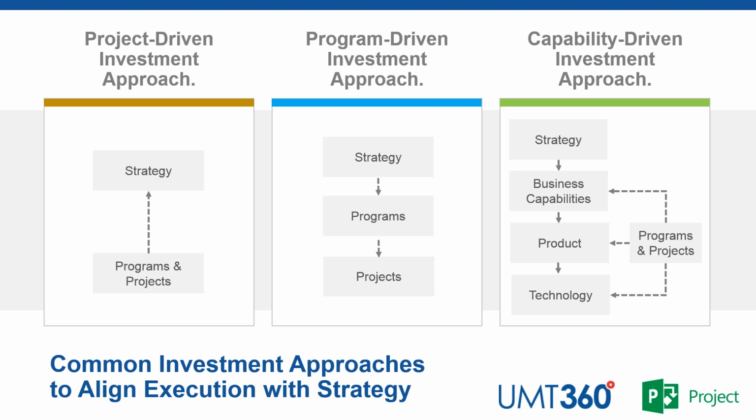Program-driven provides that systematic way of decomposing strategy into key investment programs, multi-year investment programs. Now, these are more than just reporting veneer on top of projects. These are investment entities in their own right. You're going to prioritize, you're going to apply funding allocations to them, and then generate and derive the projects that relate to each one of the programs. So just based on how this is broken down, there's a stronger correlation between projects and the strategy using programs as a natural bridge.